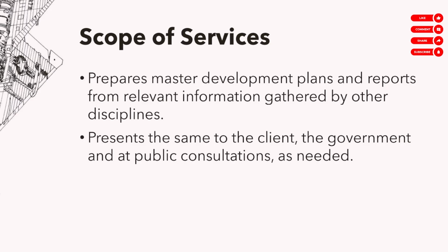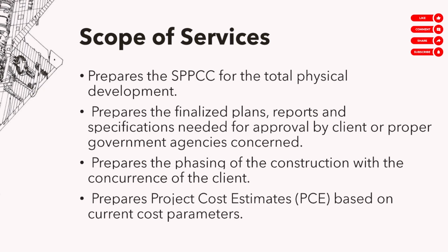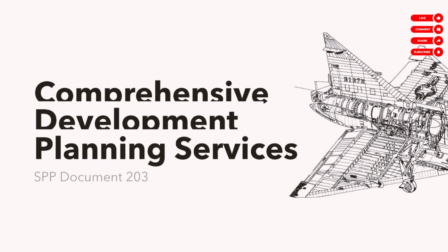You prepare the master development plan. You present the master development plan to the client, sometimes to the government if needed, sometimes in public consultations. You prepare the SPPCC, statement of probable project construction cost, gagawa ng final plans after the consultations for approval with the government agencies. Sometimes gagawa ka rin ng phasing of construction, project cost estimates, okay? Hindi nila masyadong explain ang difference nito dun sa SPPCC, but bottom line is cost estimates of the project. So that's physical planning. Okay.